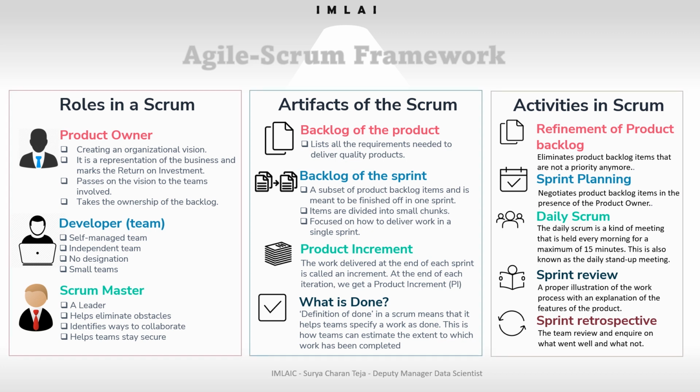The most important questions every team member needs to answer during the sprint retrospective meeting or analysis are: what we need to start doing, what we need to stop doing, and what we need to continue doing. These are the questions they have to answer during the sprint retrospective for better working and better collaboration in process, planning, and tools.